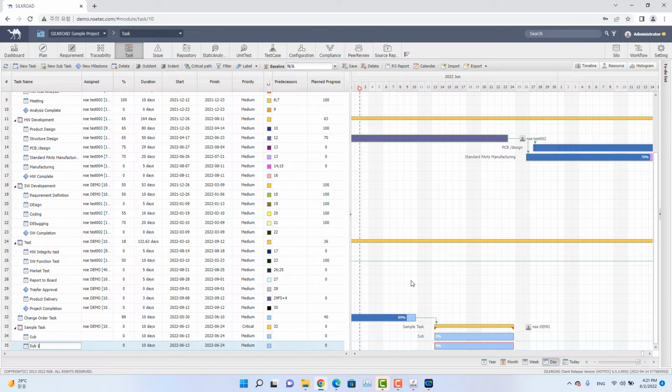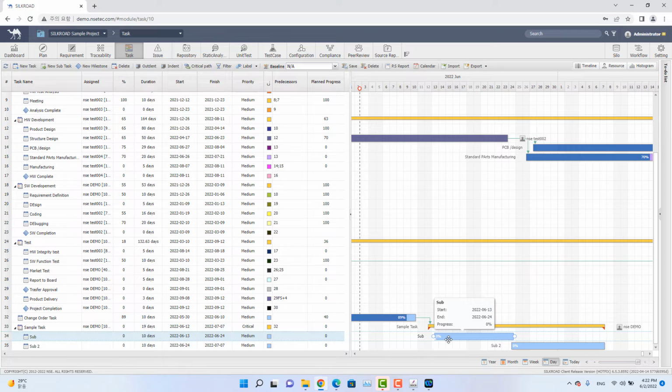The master task will continue to have subtasks as any other samples above, and the role of the master task is to represent the rest of the subtasks, which means the master task will start to summarize the whole progress of the subtasks that it holds. As you can see, the range of the master task encompasses the very start of a subtask and the very end subtask.